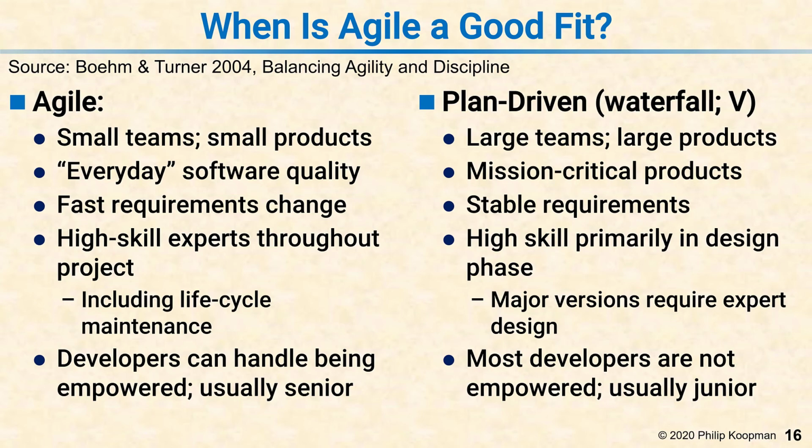However, the trade-off is if you spend a lot of time in design and you have a rigorous process with enough paper to back it up, your developers do not have to all be senior. They don't have to all be able to be managers of themselves. So plan-driven works well if you have a lot of junior developers. That tends to correlate with large products. Let's face it, if you need 1,000 developers, it's going to be really hard to get 1,000 all senior people, all of them above average, to work on that project. You're going to have a mix of senior and junior, experienced, inexperienced. Some people are good at managing, some people are not. And a plan-driven framework is going to be a lot easier to manage that kind of effort in.